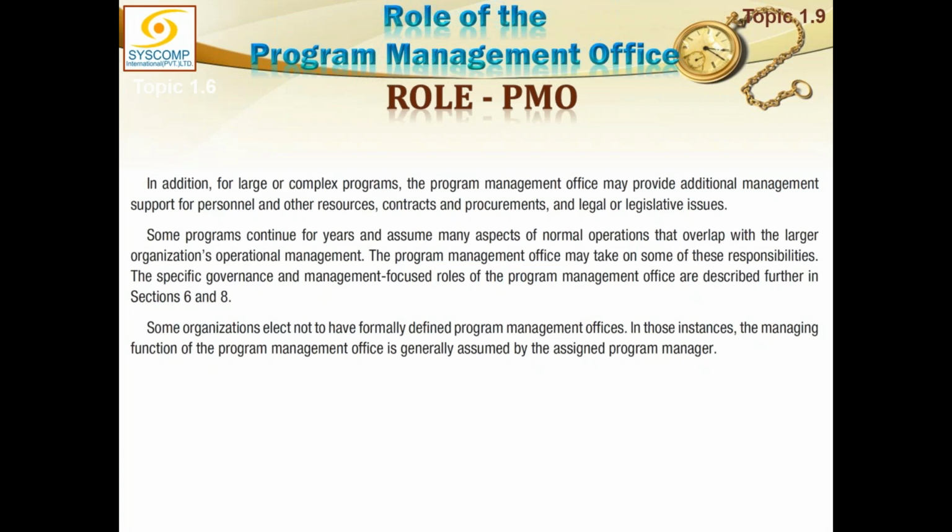Some organizations elect not to have formally defined program management offices. In those instances, the managing function of the program management office is generally assumed by the assigned program manager. If there is no program management office established within a program, then all the duties which we have ascribed to a program management office will be the responsibility of the program manager himself. So it is fair to say that if this is a large program and the program manager thinks that he cannot handle all of this job by himself, he may set up a program management office within his program.